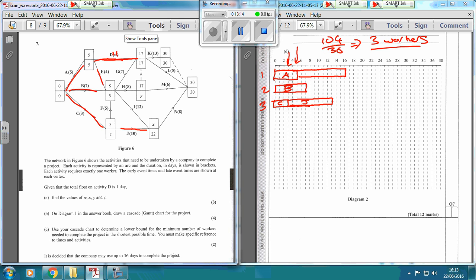We want E out of the way so we can start all the other ones. So worker 2 does E - that takes 4 days, from 7 through to 11. Then at 11 days, worker 2 is free. Looking at the big ones left, I is the largest, so give that to worker 2 - it takes 12 days, from 11 up to 23.